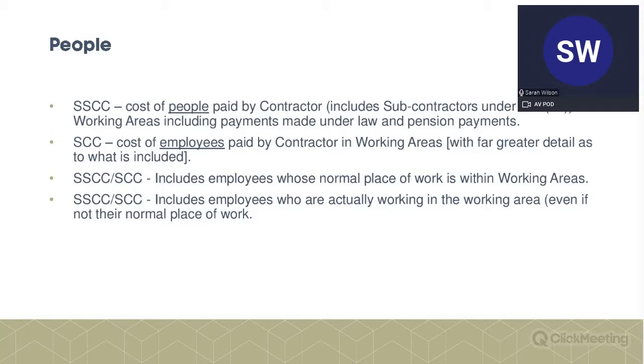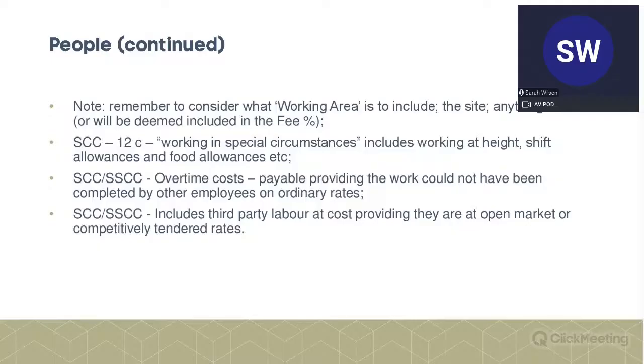If you have normally been working on a project, but you're working from home because of COVID, then you could probably be charged. If you're not normally working within the working area, but you're doing work on the project, then there is an argument that if you're working from home, you're covered within the OHP, so the fee percentage for this work rather than this people cost.